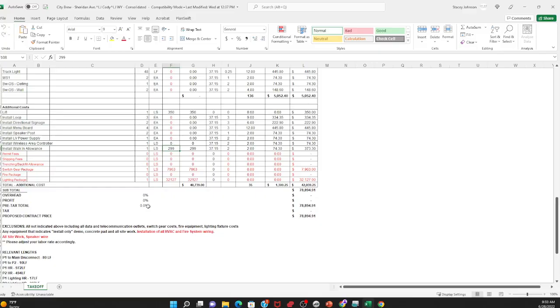What I recommend depends on the kind of company this is. If it is a huge company, which sounds like your company is, where you have a lot of employees and their trucks and there's fringe benefits and vacations and workers' comp and stuff like that, usually they will have a higher margin of overhead, of course. That overhead is usually 20%, 25%, something crazy. And then the profit may be a little lower. I mean, it really depends.